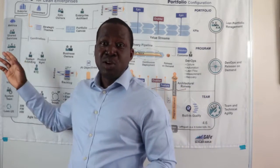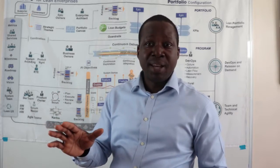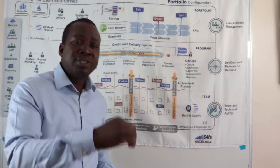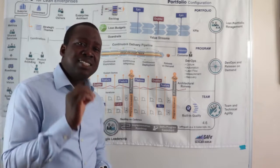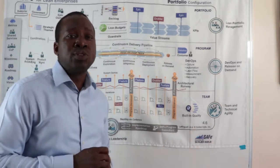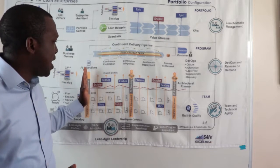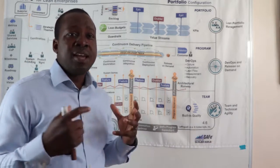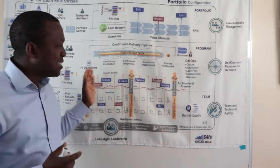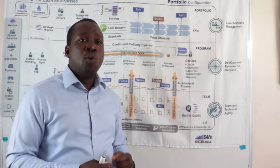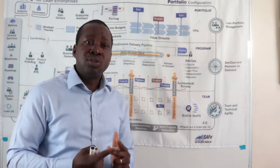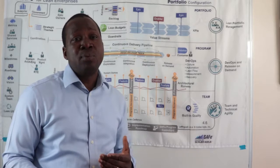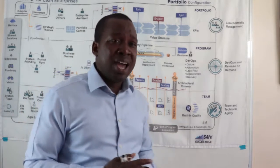We've got our milestones. In SAFe, we've got an area of milestones that provide us with performance, product and process metrics that we can learn from. We've got certain natural milestones — not artificial and fixed milestones that we find in our waterfall environment. Certain natural milestones are at program increment stages. At each PI increment, we are able to work and improve on what we've done so far based on the products, the performance and the process. They are natural milestones where we would be looking at delivering a product to the customer, or learning from our entire process, which gives us a better understanding of how we are currently performing.